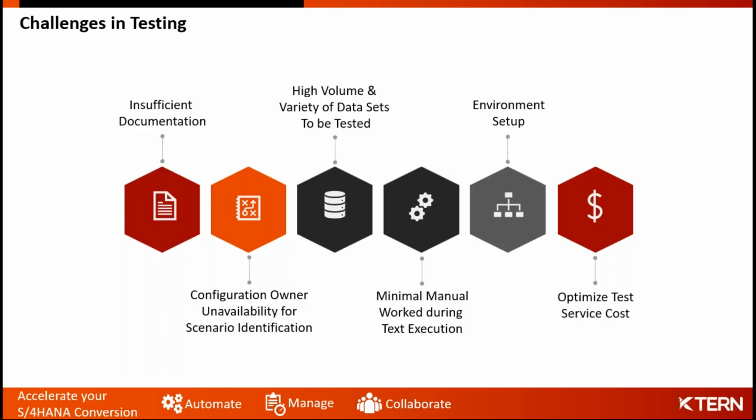So the challenges in testing would be, beyond the poll results, insufficient documentation on the current business process. The configuration owner is not available for the scenario identification, because the one who configured has to be part of the scenario identification or the test case identifications. Else it gets harder for the system integrator team to understand the system and come up with the business cases or the test cases required.